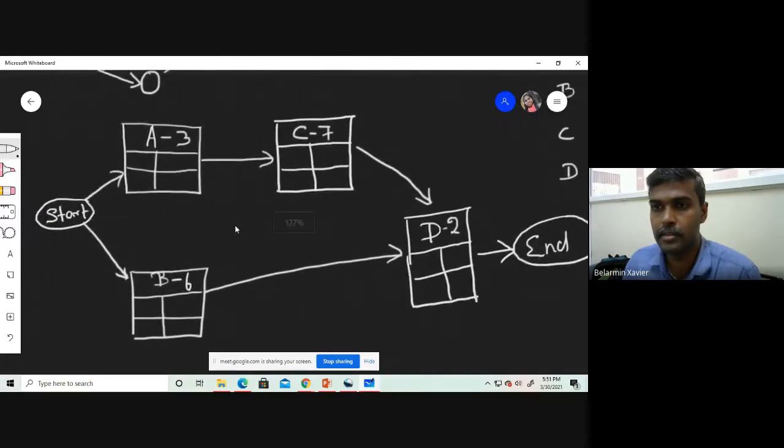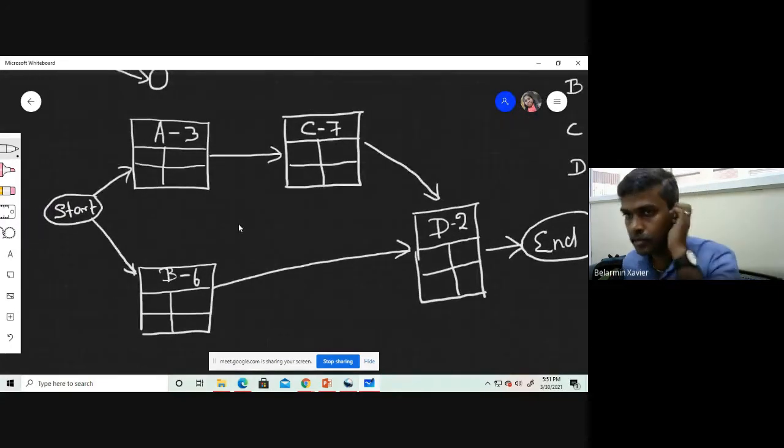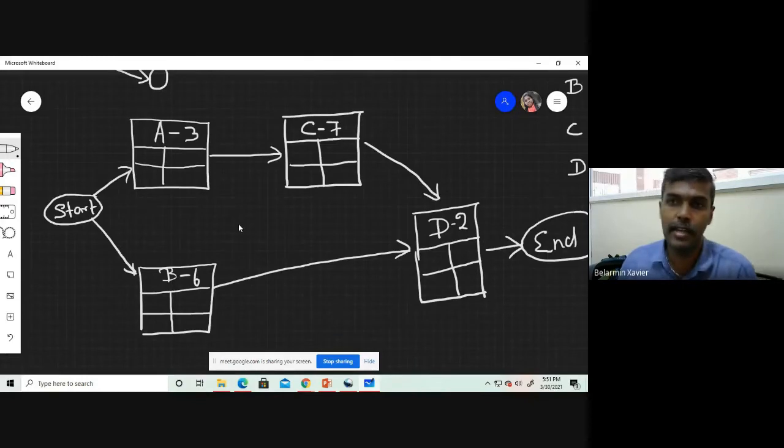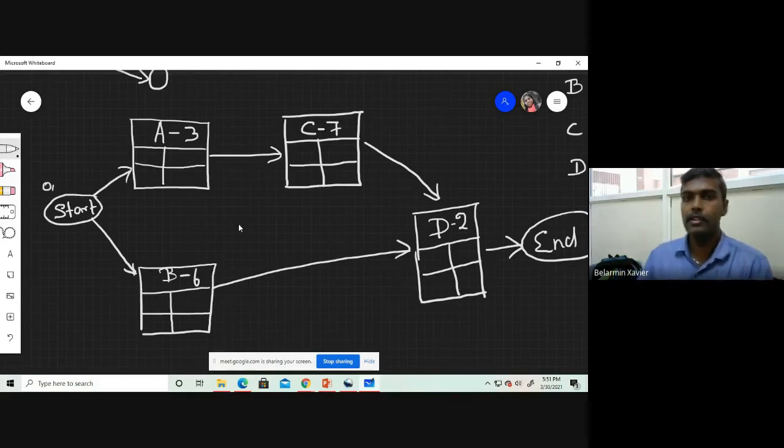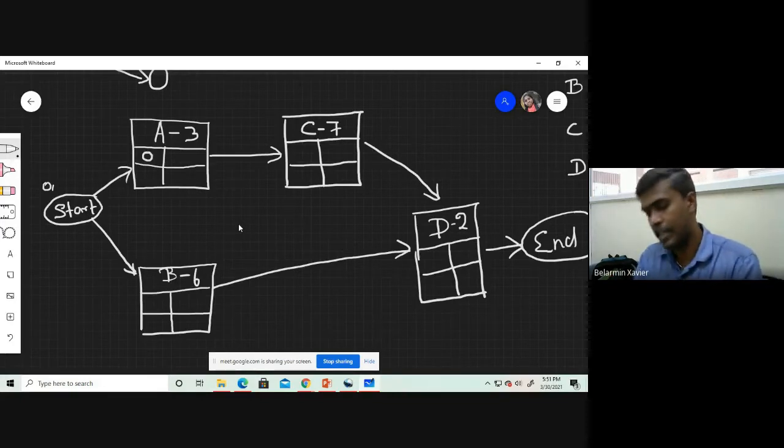I'm maximizing this particular location so that we can complete the earliest start, earliest finish, latest start and latest finish. We always begin with 0. The earliest start of A is 0. So how early can we finish activity A? 0 plus 3, 3, right?